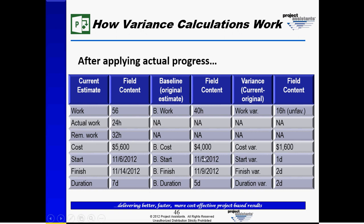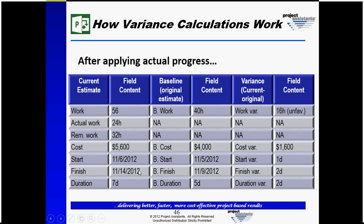The task was scheduled to start on November 5th. It was changed to November 6th, generating a one-day unfavorable variance, meaning it started a day late. And the finish date was moved from the 9th to the 14th, generating a two-day variance. It looks like more than two days, but in this case this falls across a weekend.